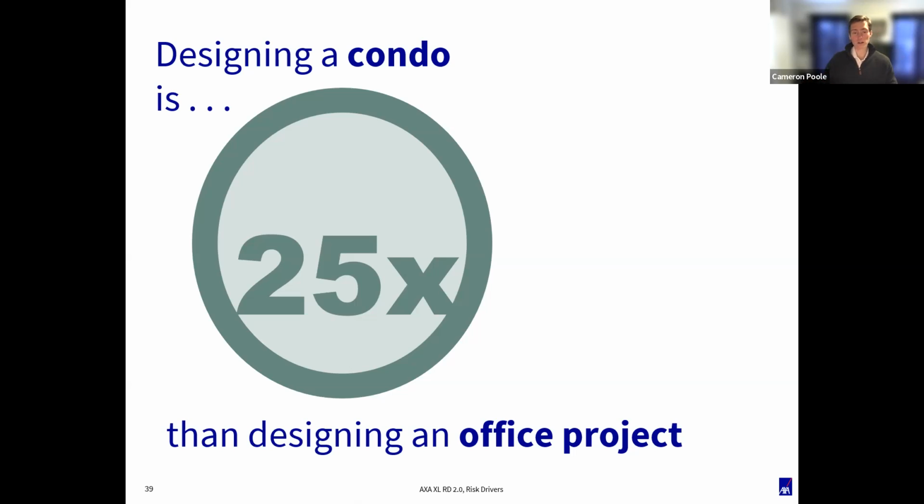Oftentimes when you're going after a project, they'll want to know if you've been sued before, if you've had claims. So I think it's an okay question to ask, but that's what you have to do: do your homework on the individual. When we look at claim statistics, something like 85% of the time architects get sued, they get sued by their client, right? It's a very small amount of the time, it's a third party. So the biggest thing you can do is evaluate that client up front. What are their capabilities? What are their motivations? And that's probably going to insulate you the most.